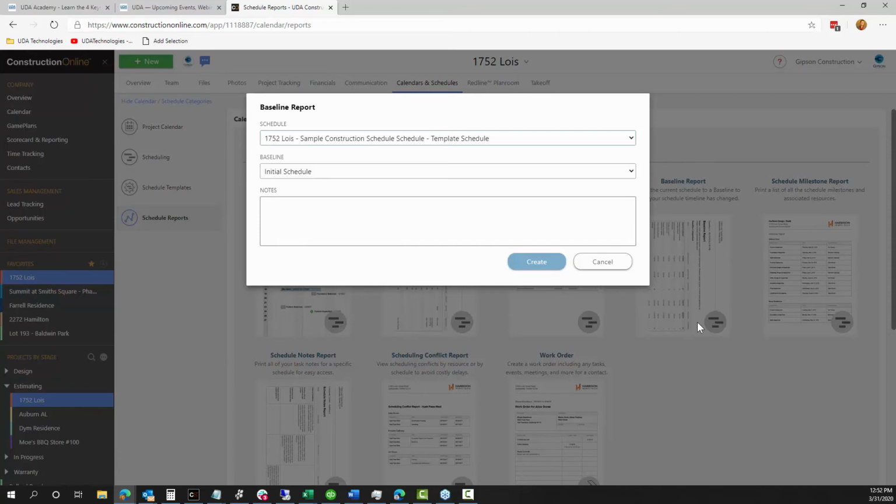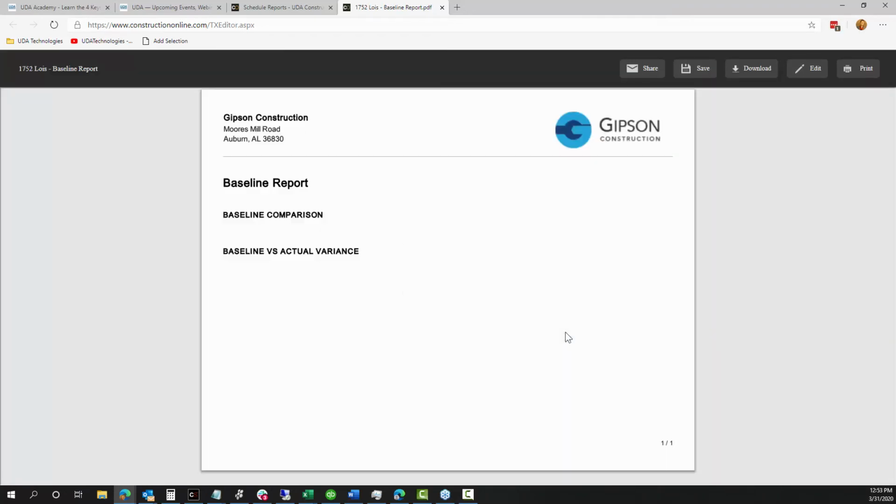This question comes up pretty often, Holly, in different training sessions or meetings I'll have one-on-one with companies for schedules, which is, well, okay, so what could we have done better for our schedules, or how could we improve on our project management tasks? Well, what I usually like to recommend is running a baseline schedule or a baseline report for your schedule that is going to pull together, where did you project you were going to start and finish for your schedule, and where did you land on that schedule?